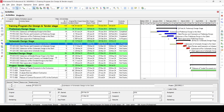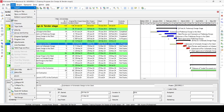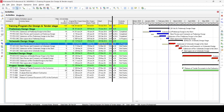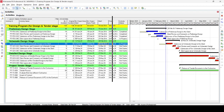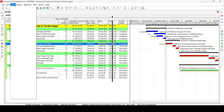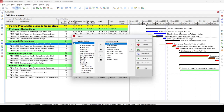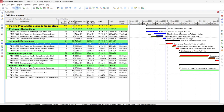In the actual program, you can see it's a small program — remove the bottom layout to get a clearer view. You can see the baseline is assigned to all activities and the actual progress is shown. We add the Activity Status column: go to View, click the Column bar, go to the General tab, find Activity Status, and press the right arrow to add it. You can now see columns for baseline duration, baseline start, baseline finish, actual start, actual finish, and status.